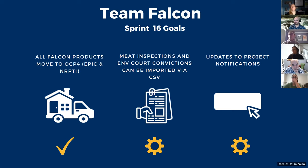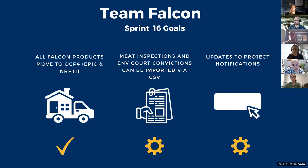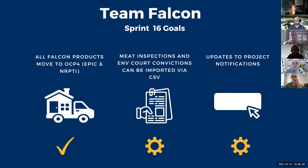And then finally, our last goal was making some updates to project notifications for Epic. So we wanted to add the ability for users to attach a document to a public comment period on a project notification. So that one's still in progress as well.